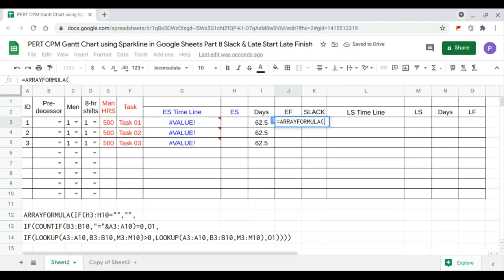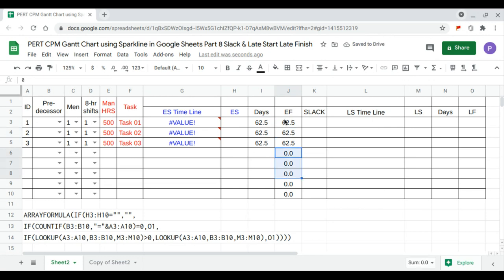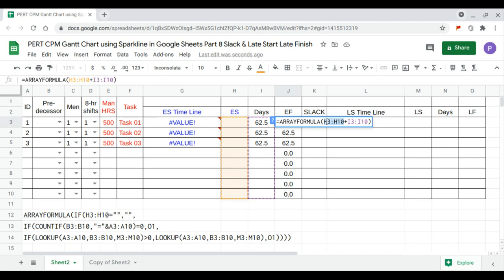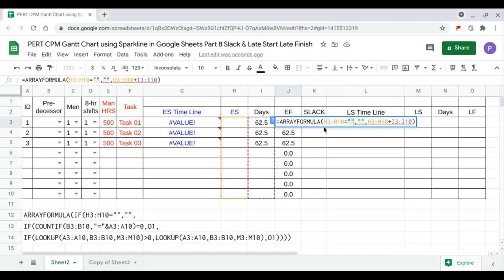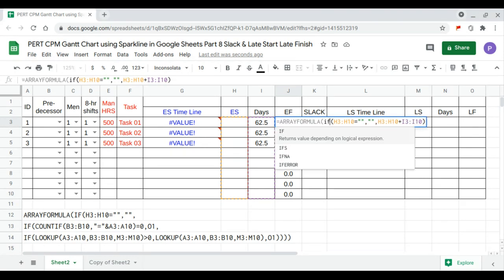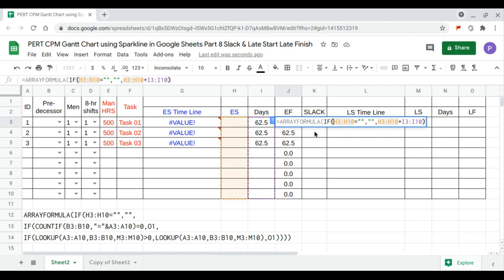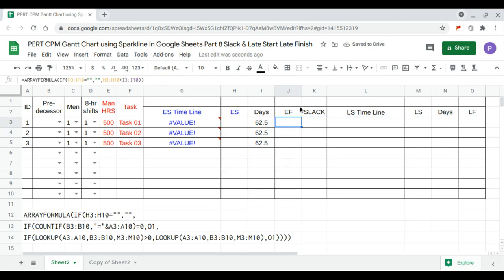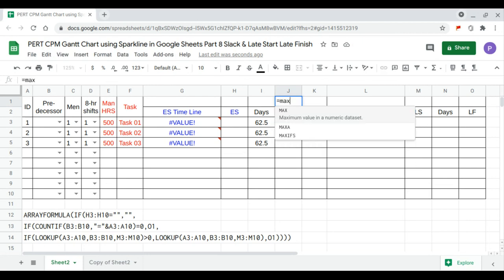The early finish formula is the early start plus the duration in days. We press Enter, then clean this up: if the cell is empty then it's empty, otherwise calculate. We add one more nested IFS condition — if empty then empty, otherwise calculate — and that's better. The early finish will be the maximum of the early finish column.